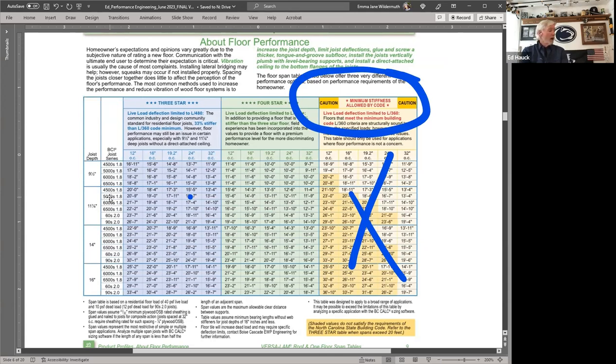And to Chuck's point, one of my own houses has a 20-foot rear section of the house, out to out. And I have 10-inch foundation walls because I use 2x8 instead of we usually use 2x6. That extra 4 inches in the span saved me $500 in that section. That's $500 for just using a different sill plate, because the end-to-end side is what matters.